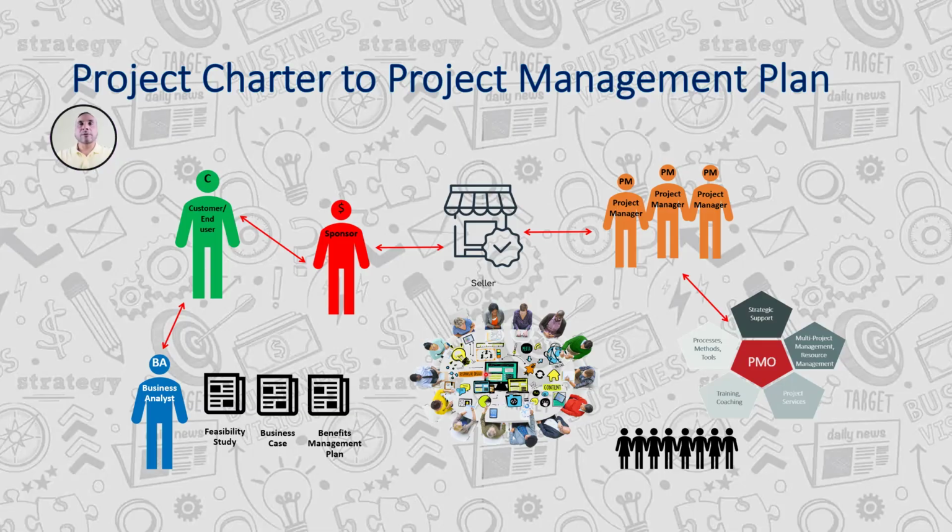Once all the work is done, the project manager will have quality control check it before it goes to the customer's hands. Then a third party will come to inspect the deliverable. Then we will go to the customer or sponsor to validate or accept the deliverable. Once it is accepted, we will go for the administrative closure. We will close the procurement, we will close the phase, and if it was the last phase of the project, then we will close the project.